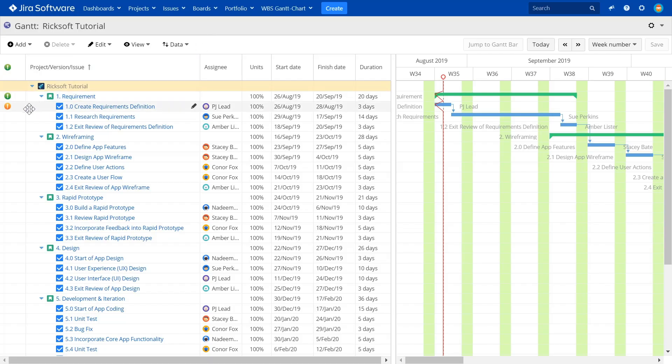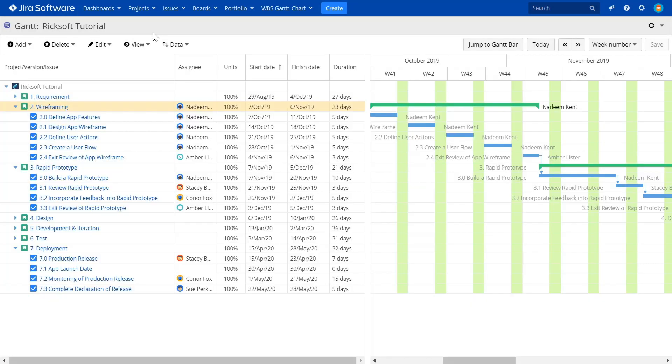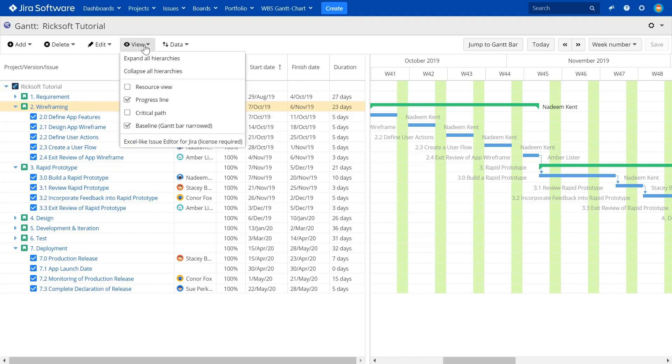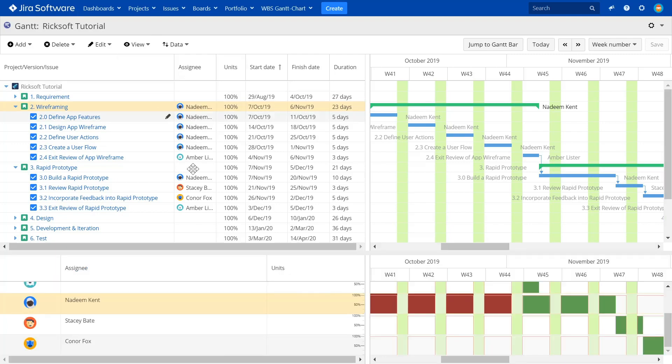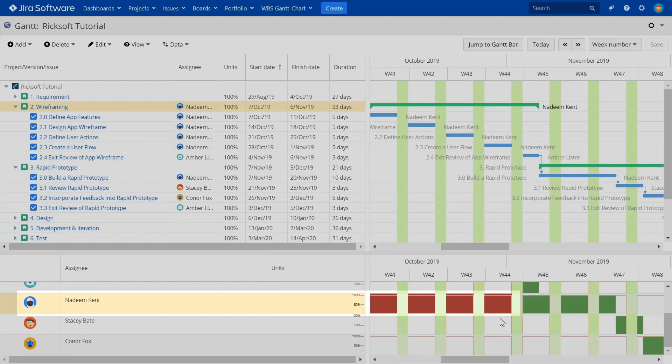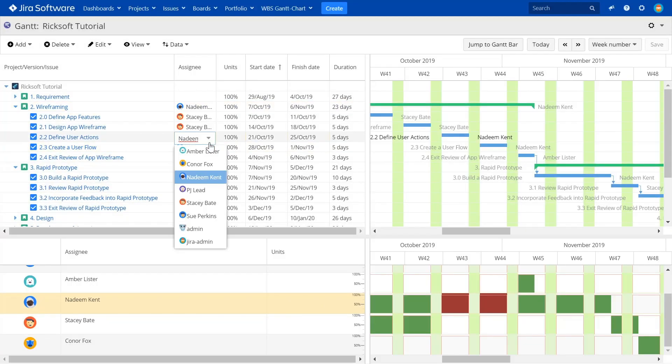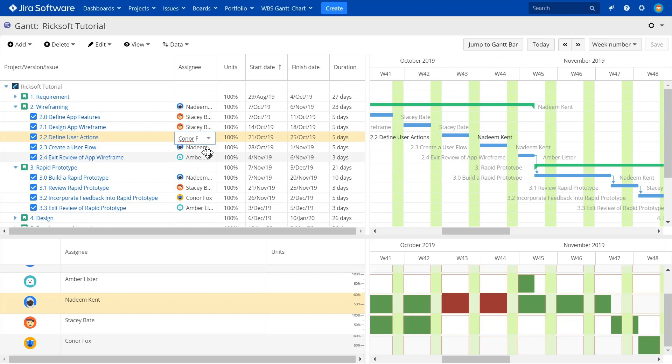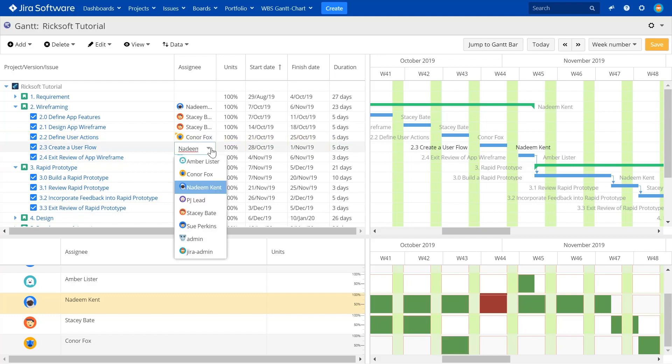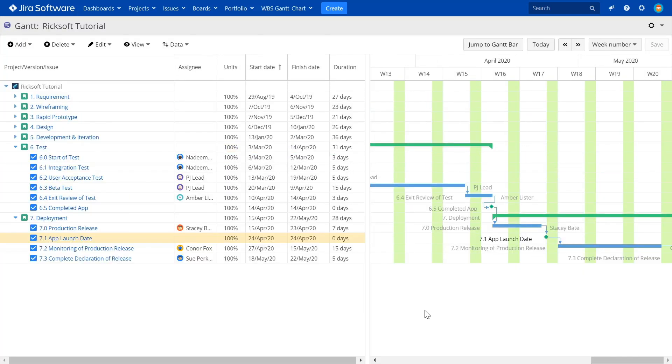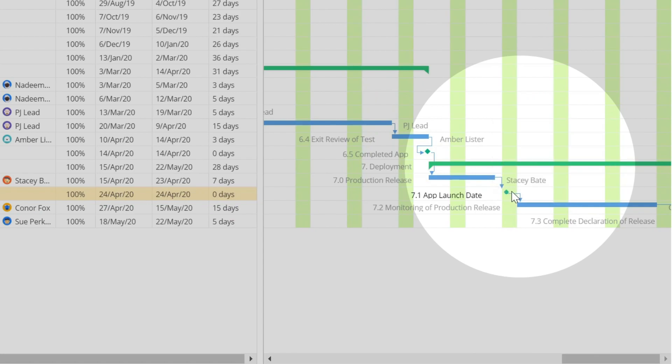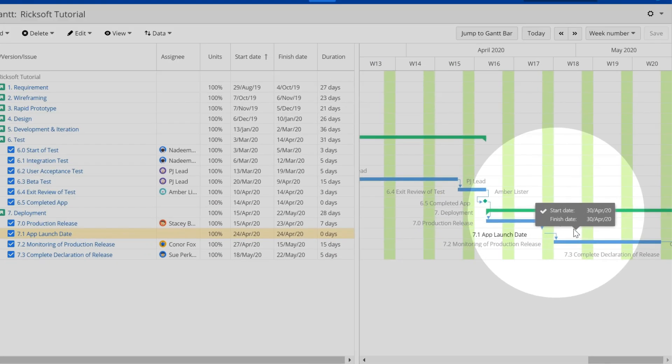Next, instantly see if your team has enough velocity to accomplish your milestones on time. If your team is behind schedule, find out what's causing the milestone to be delayed. Perhaps a team is overbooked. In that case, you could assign more team members to a task to accelerate progress. Do they need more time? Easily update the project schedule by changing the deadline for the milestone.